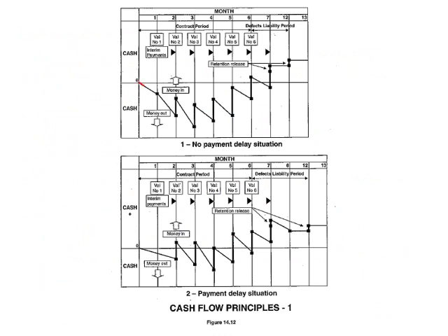So you can see you have your expenditure in the first month, you put in your claim, then you are doing more work, and you have more cash flow going out, and then you get your first payment, so your cash flow deficit is relieved slightly, but you still have cash flow outflow, and then you only get your inflow here. So you can see how the trend goes, and it's only after month 6 that you start getting a positive cash flow again, although it dips after that month into deficit again. Okay, so this is on a no payment delay situation.